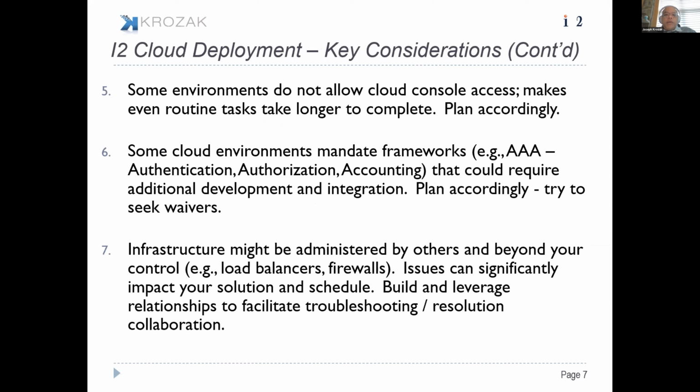Going on to number 5, this is just an item of interest. Some of these environments, depending on where you might be, don't allow direct cloud console access. So you'll be working with other members, perhaps of the administrators of that cloud, to help provision some key resources like those virtual machines I talked about. You just want to plan accordingly for that. It might take a little bit more time to get those things provisioned. So those relationships are key.